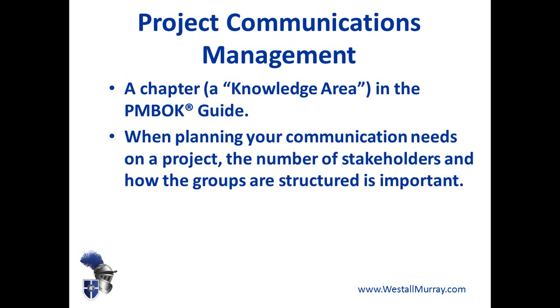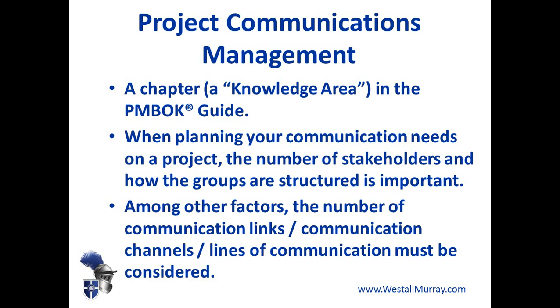Now, in addition, of course, to preparing for the exam, it's important on a real project when planning your communication needs to fully understand how many stakeholders you have, and equally importantly, how those stakeholders are structured into groups. Because amongst other things, all of that helps you determine how many communication links, how many communication channels or lines of communication there are between those stakeholders and stakeholder groups. That is a key input into planning your communication needs.